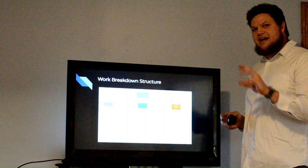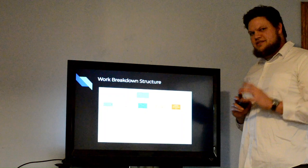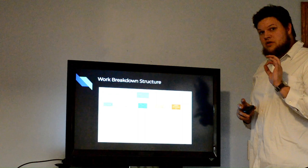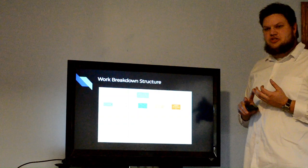Unsurprisingly, hardware integration and software development are where we anticipate spending the majority of our development cycle of this AR test bench augmentation. However, equally important, end product testing and product enhancement. An iterative process at the end of the development cycle to take feedback, to provide polish, to ensure that things work seamlessly. Setting aside time for this is critical to not overrunning deadlines or presenting a rushed final project.